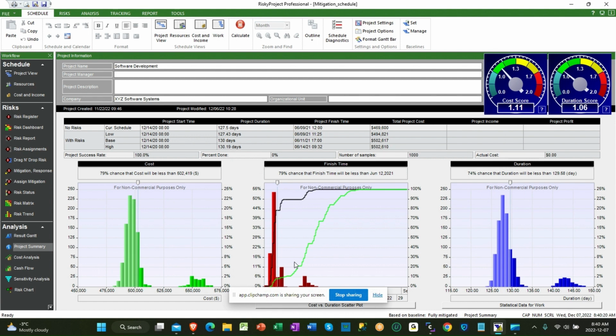This is what we think we're typically going to use to actually develop our cost and schedule margins and contingency. It may be that once the project gets executed, you're going to use a non-mitigated one, and as it gets executed properly and you have actuals, it will burn down. But this is what we'll do to develop our cost and schedule contingencies.